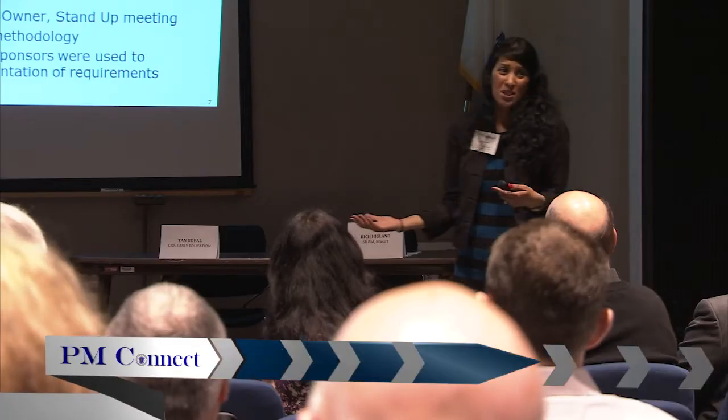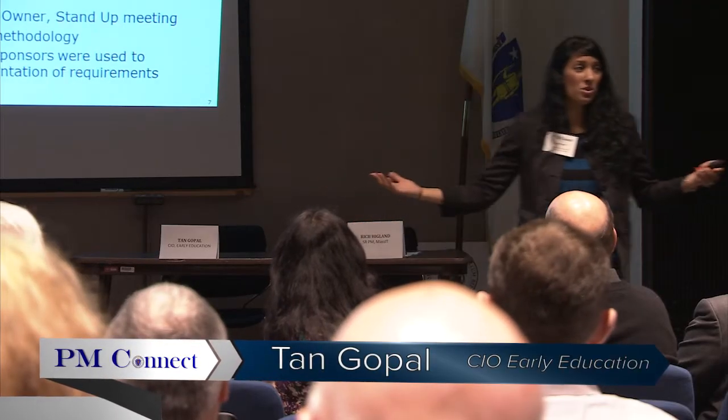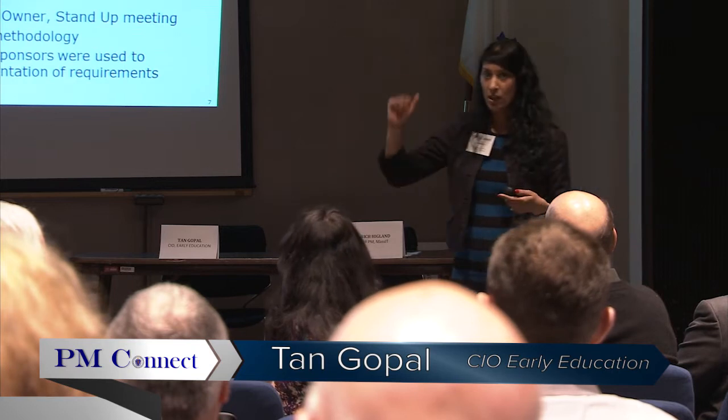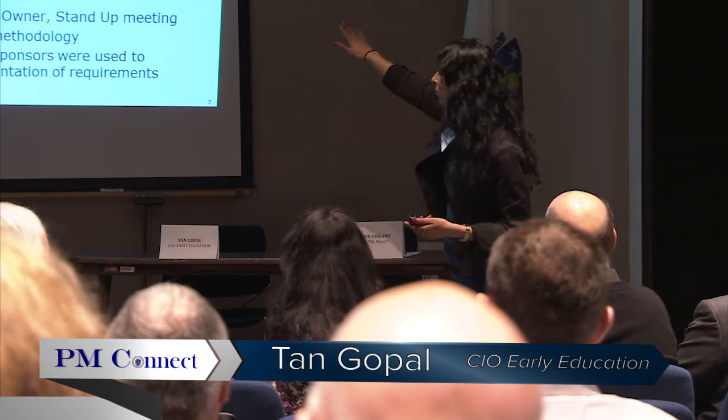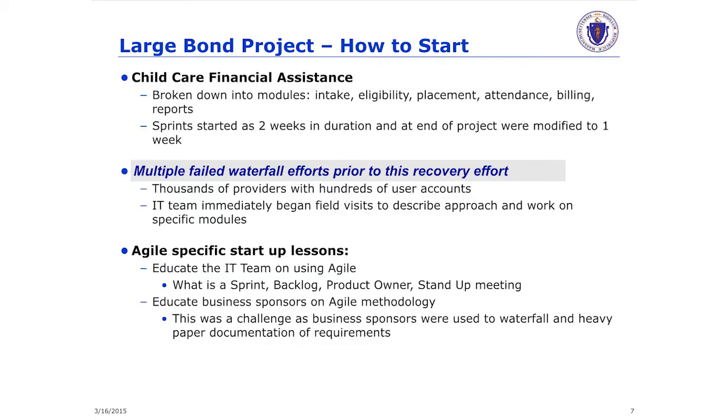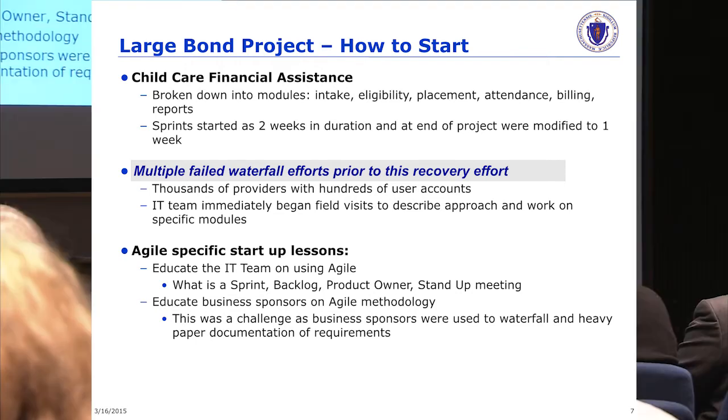So then how do you start? This is a big project. I don't know where to start, what to do in my first sprint. It's okay. Think about what Agile, just break it down. Any type of software project, any type of project, you can break it down into big modules. So just start there. Maybe that's your first sprint.